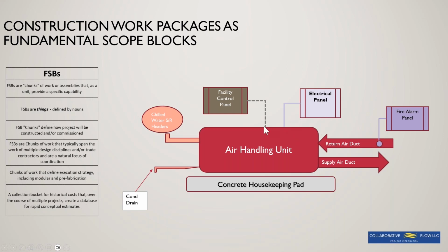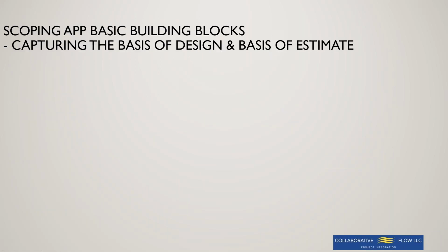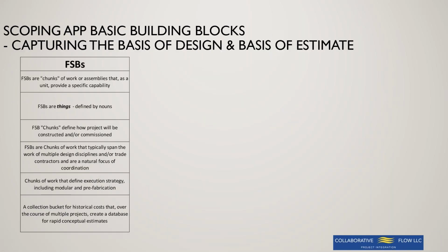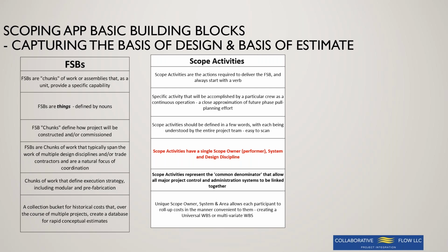So I'll talk a little bit more about scope activities. We talk about FSBs, but scope activities are actions. Whereas FSBs are nouns that describe the what, the scope activities describe the who and the how. They're very closely aligned, about the same size chunks as installation work packages. And one of the things we've discovered is maybe installation work packages should be defined by who they're going to hand off the work to and how it all connects together.